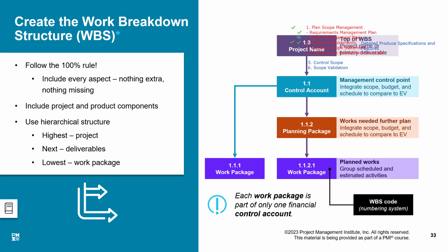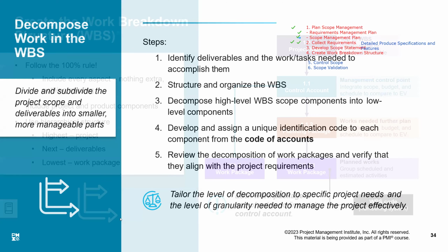But this planning package, because it is a black box, when it is clarified, can also be broken down into work packages. Those numbers will follow the planning package numbering, that is 1.1.2.1, 1.1.2.2, 1.1.2.3, 1.1.2.4, and so on. But as I said before, we are not going to go deeper than a work package. That is not our job. Anyways, moving on, let me conclude this.